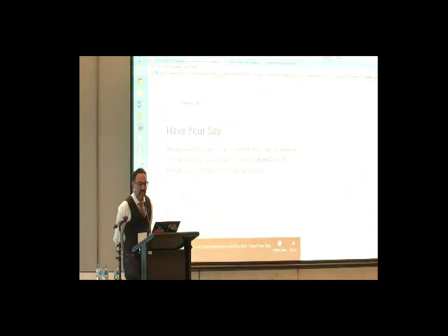We had started the project with wireframes, interactive specs, and quite a lot of detail. We wanted to go live by June, and we started the discovery phase for 2 weeks in December. So when we had the full backlog, we had to work out and estimate what we could actually get done by June.